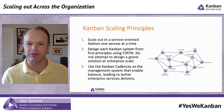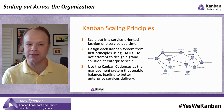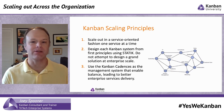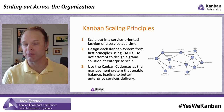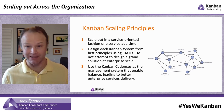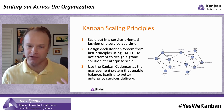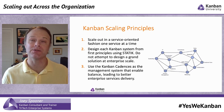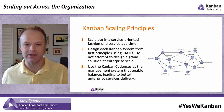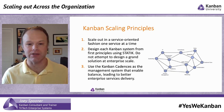So when we're looking at Kanban, we're using STATIK, which has a few key steps. We're looking for sources of dissatisfaction — why are we even doing this? I can't tell you how many times I've been in organizations where they said let's just do this grand plan, and people start to ignore the plan the minute it's announced. If you do the sources of dissatisfaction practice, you're going to find that there's motivation right there to improve, some pain to address and resolve from the end users, from inside the team.